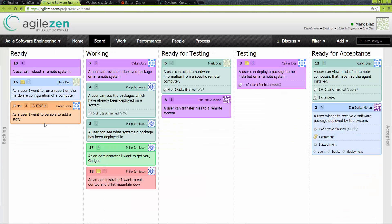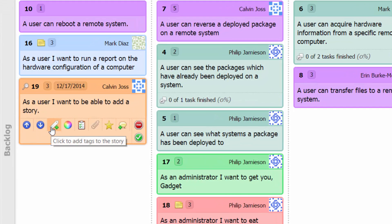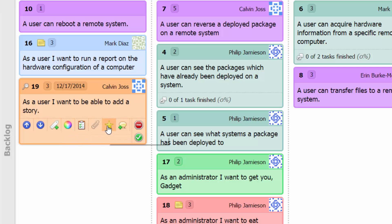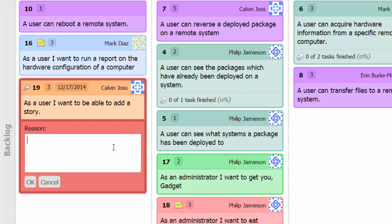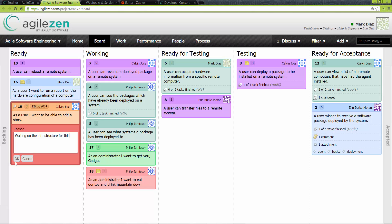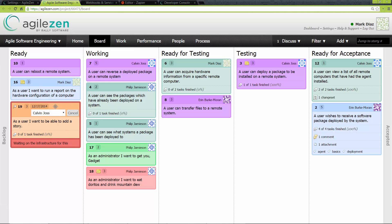By clicking on a story card, you will reveal some buttons for quickly interacting with the story. These actions include almost everything from the detailed story view but without ever leaving the board. You can add tags, change its color, add or edit tasks, attach files, create new comments, or make a story blocked or ready. Blocking a story and including a reason makes it very apparent to a casual observer that something is wrong — this type of instant and intrinsic communication is where AgileZen shines. The block can be removed manually; however, moving the card to the next phase will also remove the block.